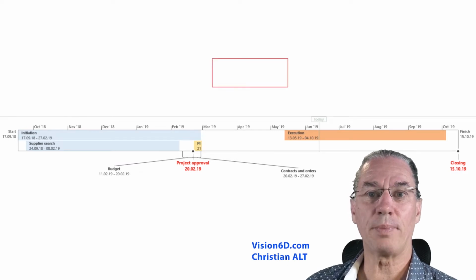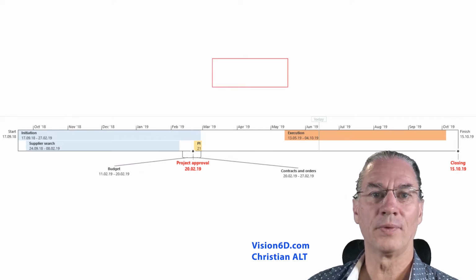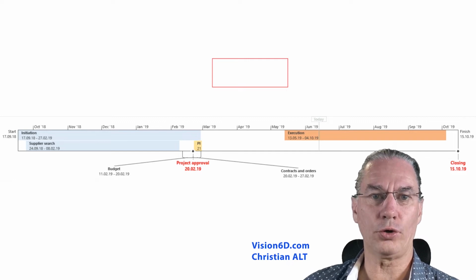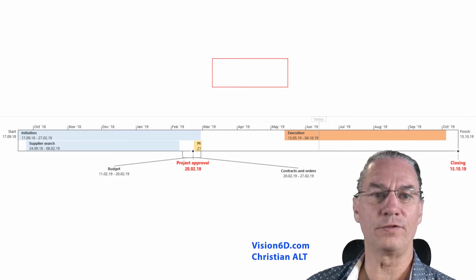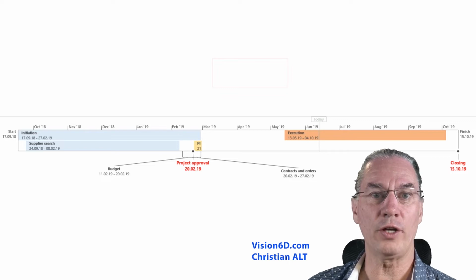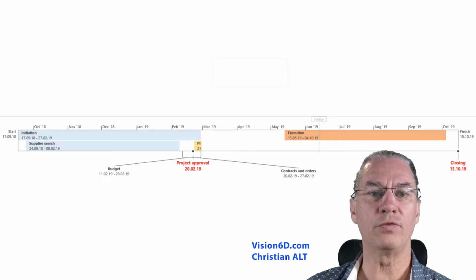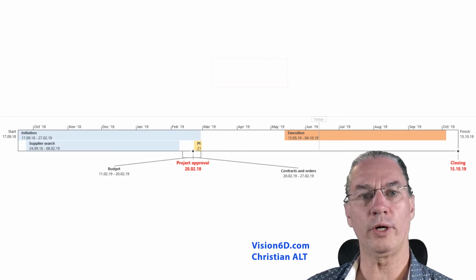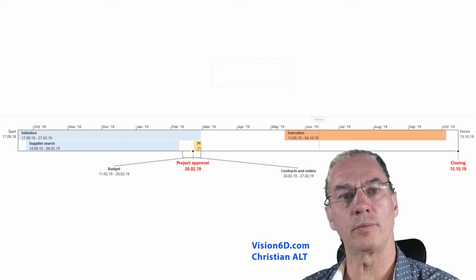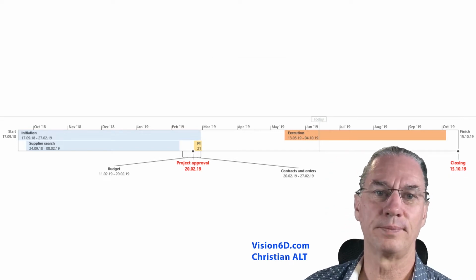So what is that space in white in the middle? Once I placed orders, for example for the windows we were changing, we had about 12 weeks to wait before we were delivered. So once the orders were placed, there was a waiting time of about 3 months.